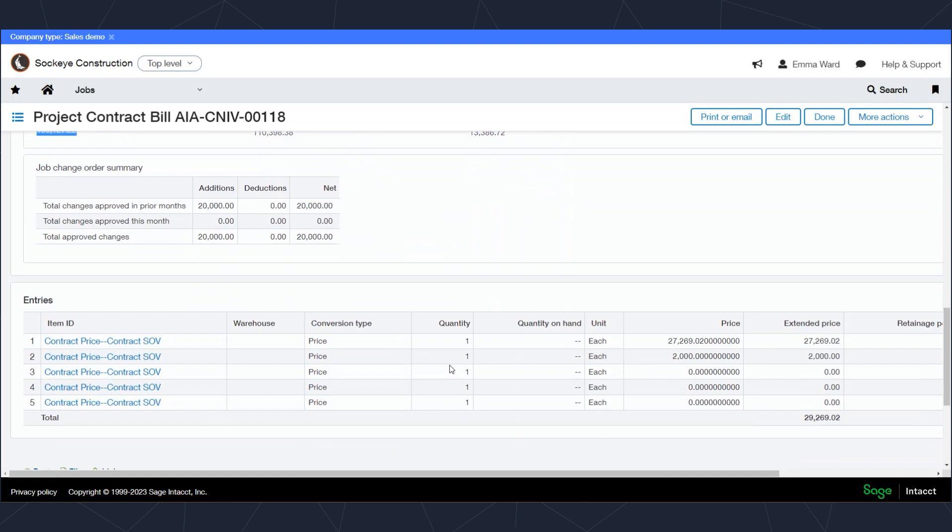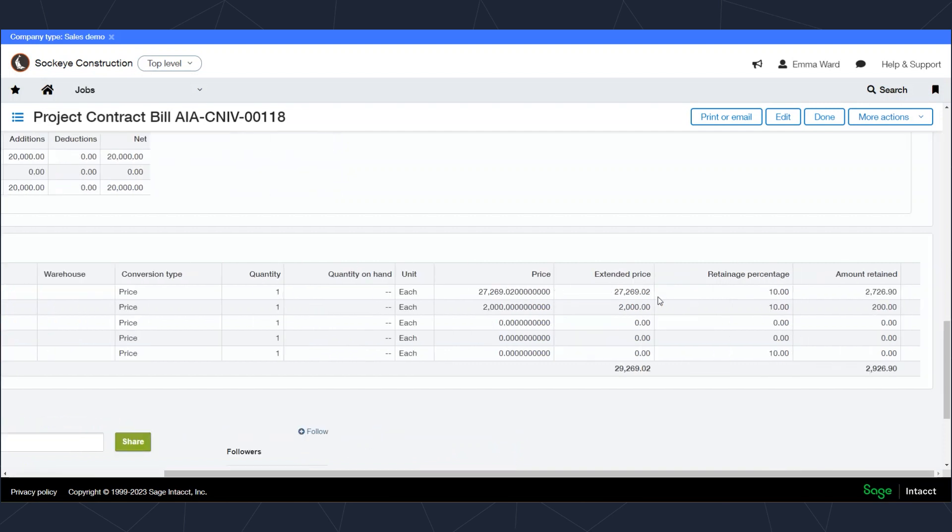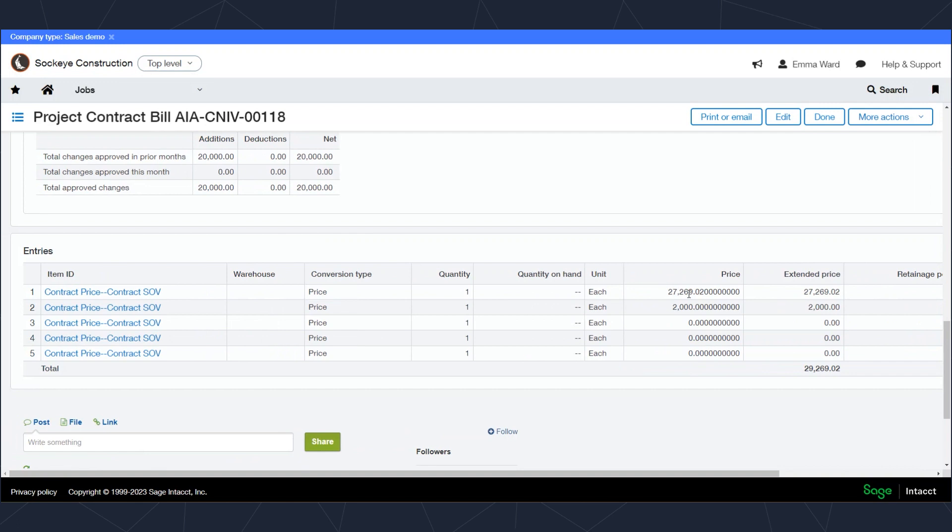I can also see those details by contract line as well, which is super helpful. So in my entries, I'll see all the lines on my schedule of values. And even though I'm only billing two lines on the specific invoice, I'll see the extended price and the retainage amount. So you get a little extra visibility.